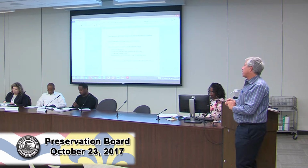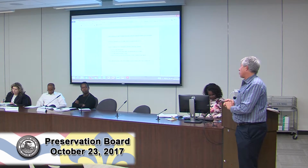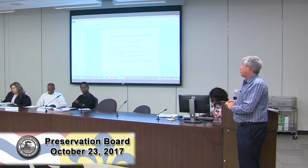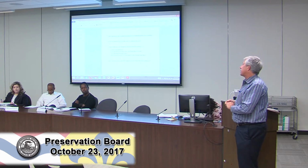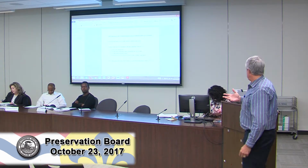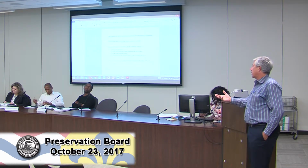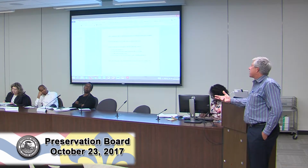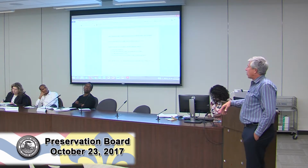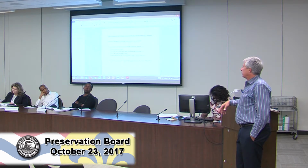And the difficulty I've had with a lot of the lenders in getting the financing together, which I did want to phase originally, is a lot of them didn't want to lend on it unless they had financing in place for the entire project, because they didn't want to see me do one building and then have a derelict building next to it, although I have all these other properties on South Broadway and Carondelet Business District that I lease up almost despite the fact that there are problems and gaps in buildings that are deteriorating.